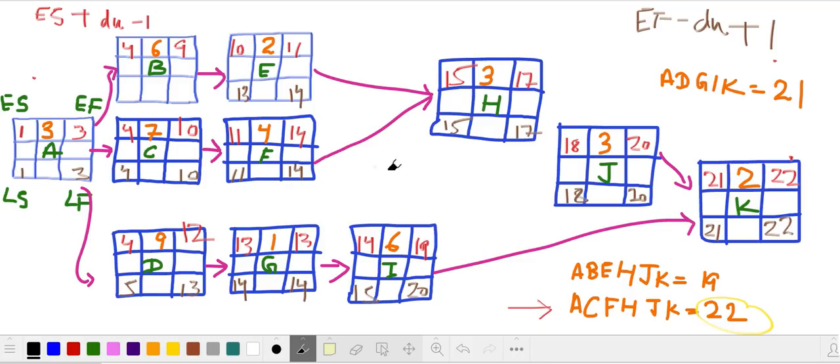You will notice in this critical path, any of the activity, 15 minus 15, it's 0. The float is 0, and critical path float is always 0 no matter what. If it's not coming 0, it means you have made some calculation mistake. So this one always has a float of 0. 22 minus 22, 0. 18 minus 18, it's 0. That's the formula to calculate a float.